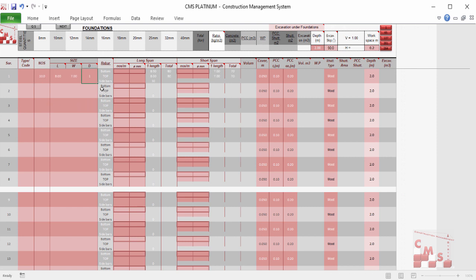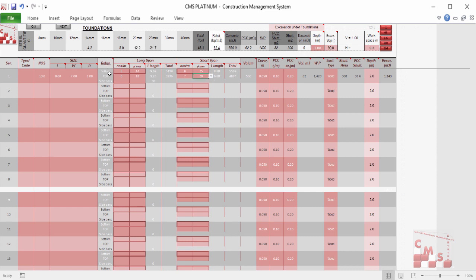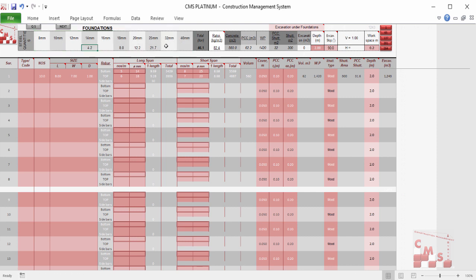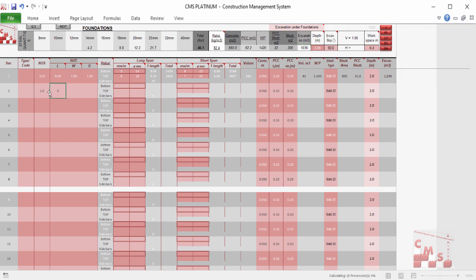We have the bottom and top reinforcement for long and short span. CMS directly gives us the quantity of reinforcement concrete, the quantity of blinding concrete, detailed quantities for rebar per diameter, the ratio between rebar and concrete, waterproofing, and shutters for the foundations — also the type of shutter, either block, wood, or other — plus the excavation quantity. The same can be done for any other type of foundation according to your design.